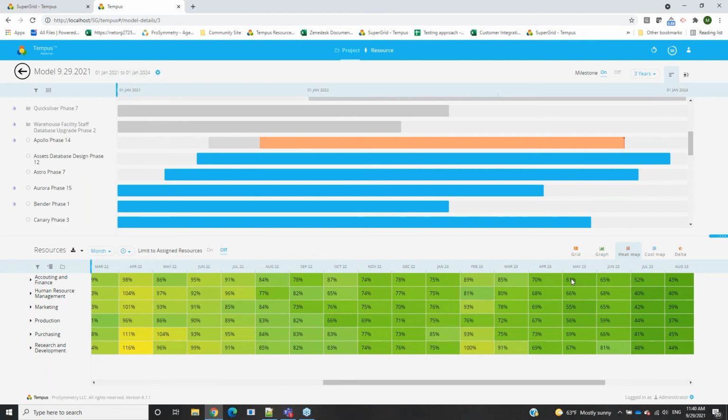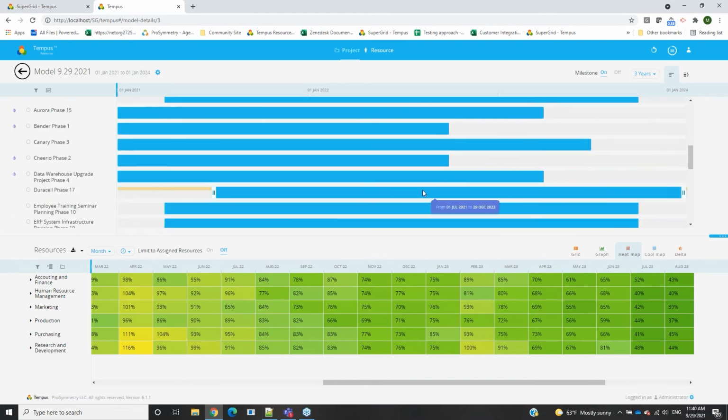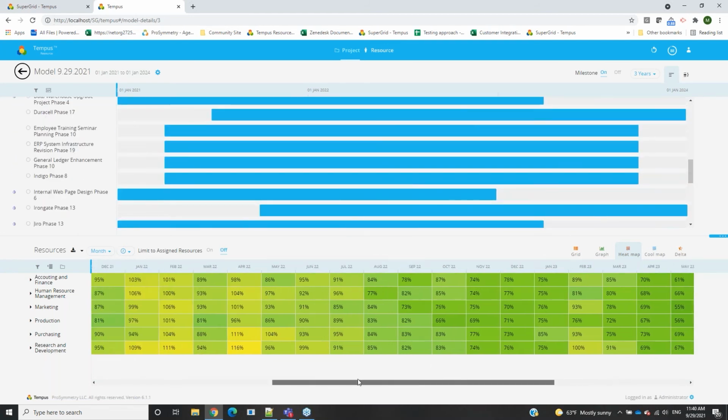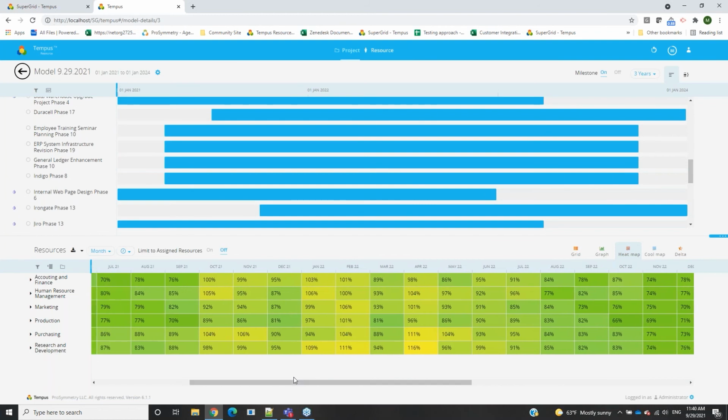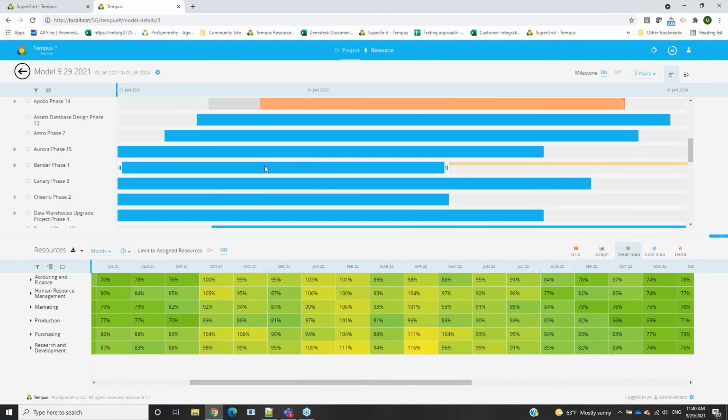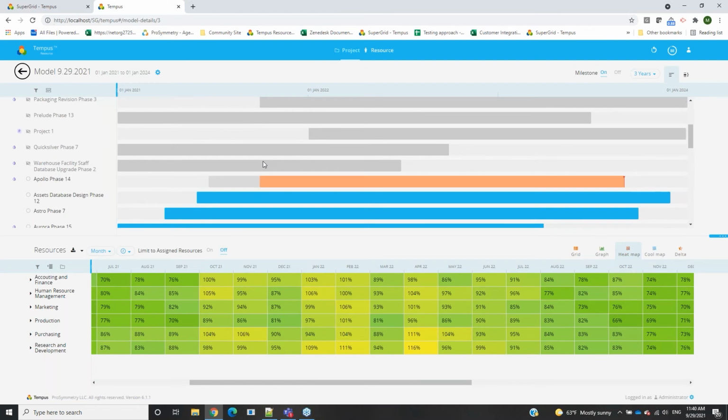So as more projects come in, we can definitely add more, and we definitely have the availability to work for those. But down below, you can at least see in the middle of here that we're looking much better, around that 100% mark of our resources, and we can definitely add some additional projects, or there's also the scenario to potentially remove capacity of your resources instead to see if there aren't those additional projects that need to be added.